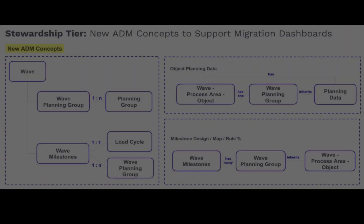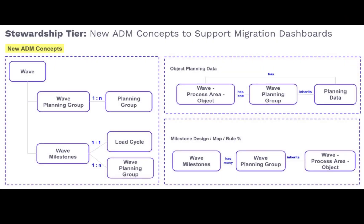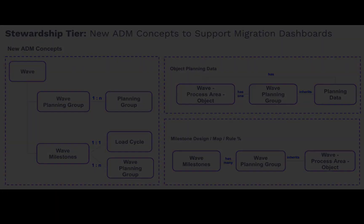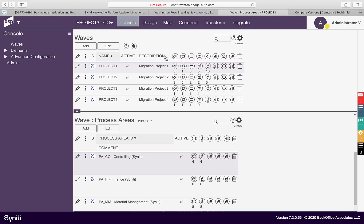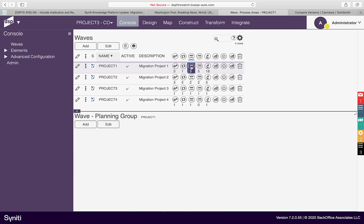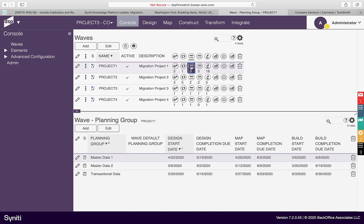To support the new Migration Dashboard capabilities, the Stewardship Tier 7.2 version has introduced some new concepts and functionality. The first new concept is that of planning groups. Planning groups are assigned to waves and are used to group together objects for planning purposes. This allows a migration project to be broken down into smaller blocks of work that can be more easily managed and tracked. A wave can be assigned to one or more planning groups.